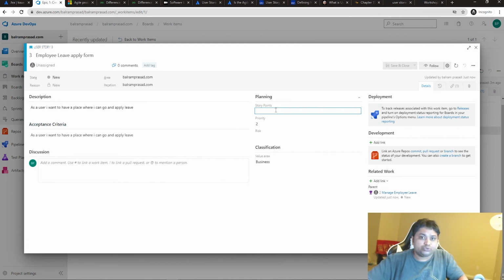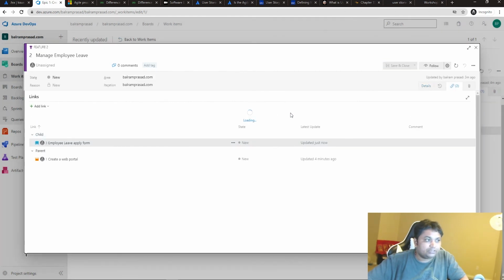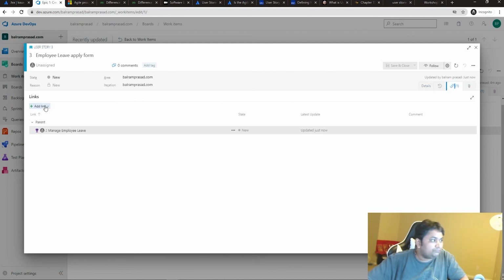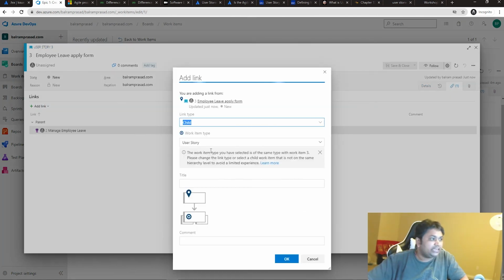User story estimation generally happens on a point basis. It is a sizing of whether this user story is going to take a big amount of time or a small amount of time. This is not on an hourly basis or anything like that. So you can say that three means medium, a medium kind of complex work, right? That's the story point, and then once you pick that one, you can create the task, right?